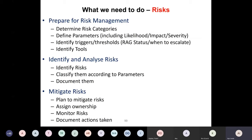So with this, you're saying, including likelihood, what is the likelihood, from 1 to 5? Because we know LBB seems archaic. They're not like London, not like Chelsea, Borough, and all of that. So they are archaic in a way. So there is a possibility that some of the laptops might still be on Windows 7 or Vista and not Windows 10. I'm sure you now know my age while I'm talking about Vista. So with that, we say, okay, what's the likelihood? The likelihood is 4 because the possibility is so high, the probability is so high.